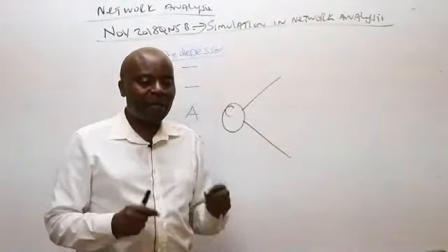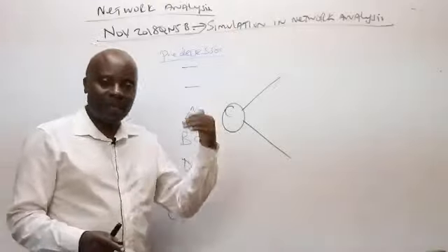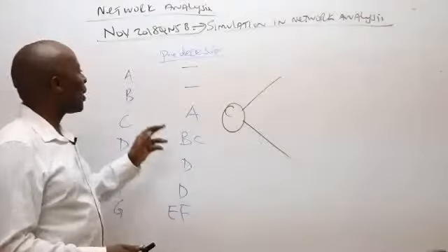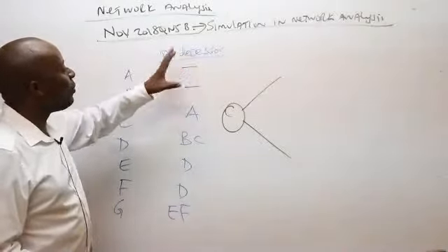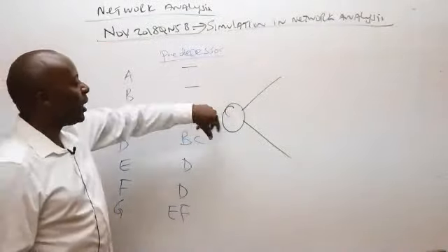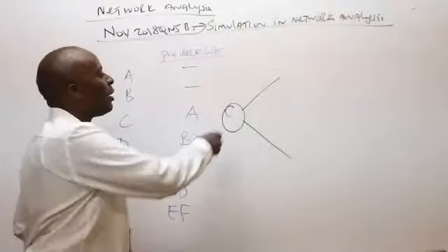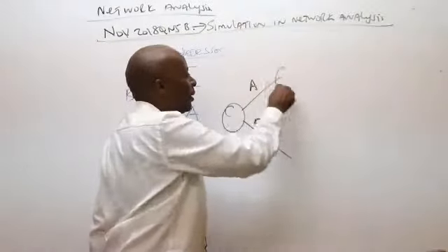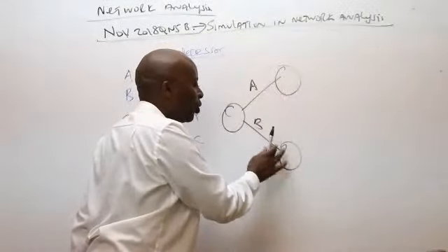So in this case, Kibaki, yes. Kibaki came, and then after Kibaki we had Uhuru. So here we are told that A and B do not have predecessors at all. So they must commence from the project start node. This is activity A, this is activity B. From there, give them their project completion nodes like that.